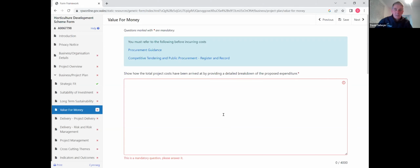Golden rule: over £5,000, you need 3 quotes. Okay.